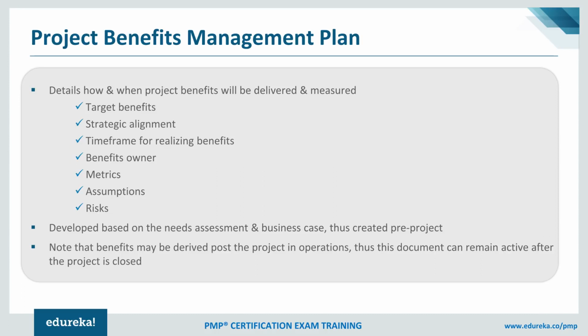One thing that we need to remember under this is that even though you create the plan well in advance, the benefits will start coming once your product is introduced in the market or once it is live and used by the users, etc. That means the real benefit management plan will be active. First of all, even though the project is completed, still the plan will be active, because once the project is live or the product is live or it's in the market, you will start measuring the benefits and start comparing the performance against what's captured as a part of this plan.